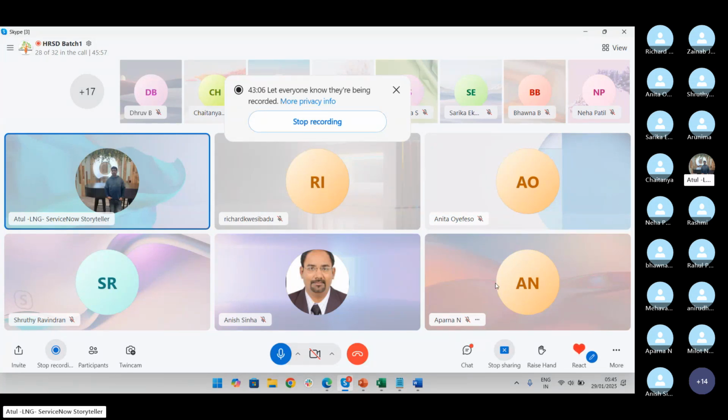Before we as a consultant go for the workshop, number one, we should read the SOW, the statement of work, that is what the customer has signed off with my company to buy or to implement. Second, we need to ask our pre-sales or sales team who my stakeholders are.